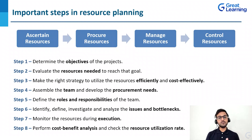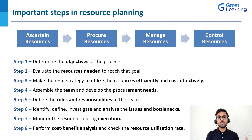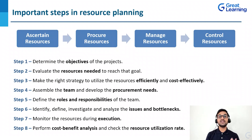Step eight, perform a cost-benefit analysis and check the resource utilization rate. Understand what you have actually learned from that particular project, and take those learnings to implement in the next project as well. You start with determining the objectives of a project and end with doing the cost-benefit analysis and taking learnings from that project in terms of resource planning.